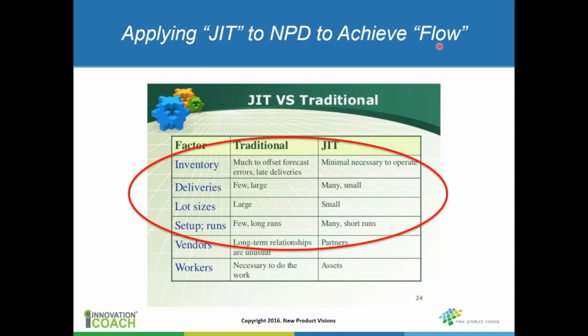So you can use that concept to break workflow down and look at how you can divide up the work into smaller chunks, not haphazardly, but in a purposeful way, in order to allow you to achieve flow through the system. You might use, for instance, 15-minute stand-up project meetings, daily project meetings, rather than waiting until the end of the week. So that's one way to implement some of these lean processes. Again, I'll put that aside for the moment. It is something to think about in terms of how you manage workflow, and I think we'll come back to that in a future session.